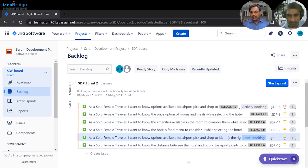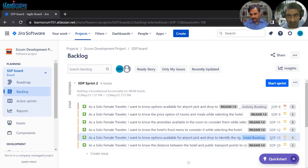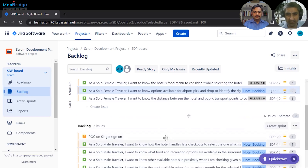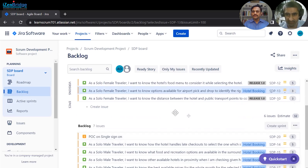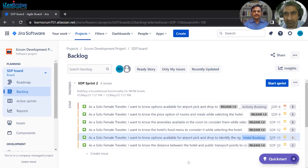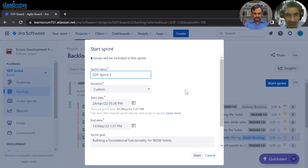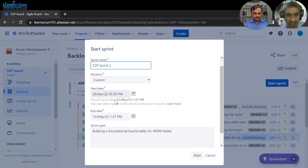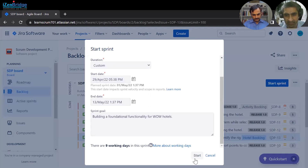We will now see how the 'Start Sprint' button works and what information gets added once the sprint starts. Assuming sprint planning is over and we want to commit to the sprint — once started, if you add or remove any items, Jira will show a pop-up saying you are changing the scope of the sprint. Starting the sprint shows how many days are in the sprint.